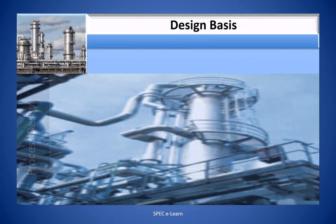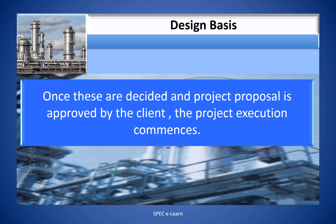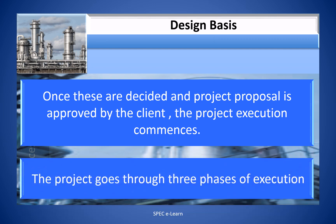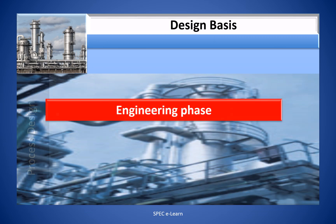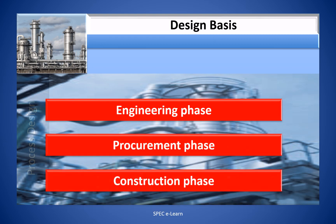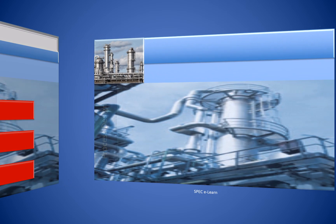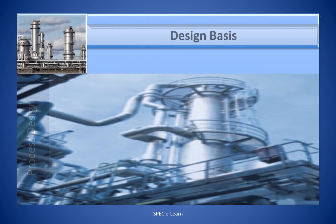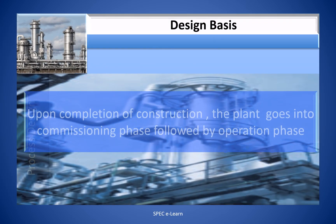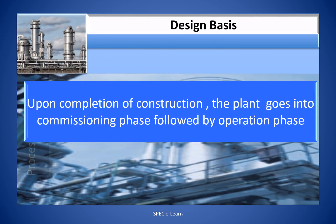Once these are decided and the project proposal is approved by the client, the project execution commences. The project goes through three phases of execution: engineering phase, procurement phase, and construction phase. Upon completion of construction, the plant goes into commissioning phase followed by operational phase.